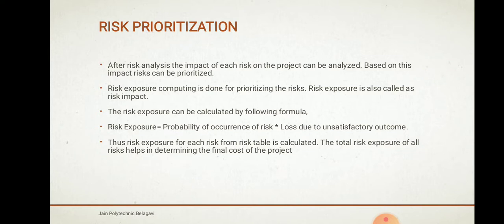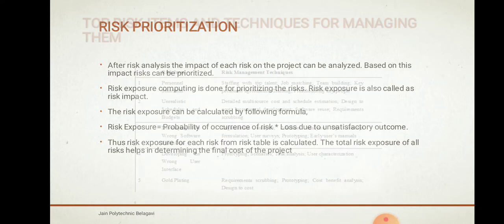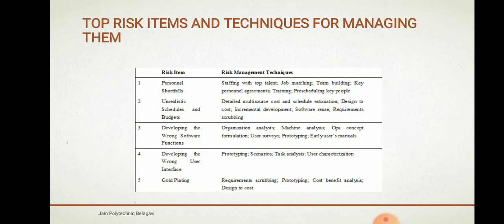Based on the impact, risks can be prioritized by computing the risk exposure. Risk exposure tells us how much the risk is going to cost the project. It is calculated using the formula: Risk Exposure = Probability of Occurrence of the Risk × Loss Due to Unsatisfactory Outcome. The total risk exposure for all risks helps in determining the final cost of the project.